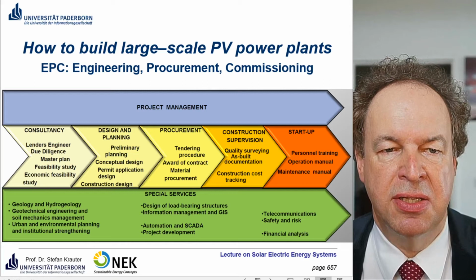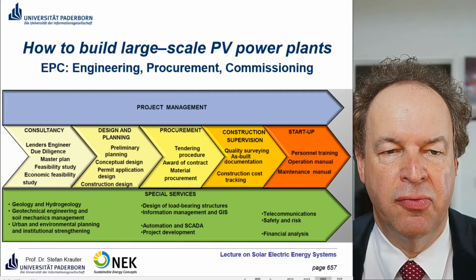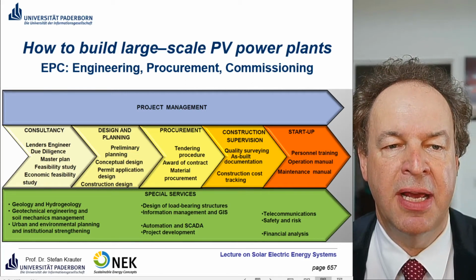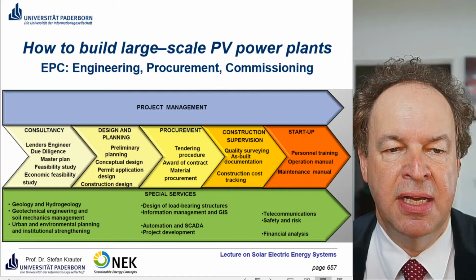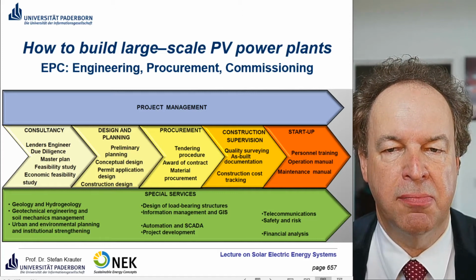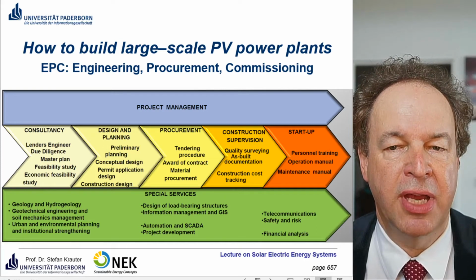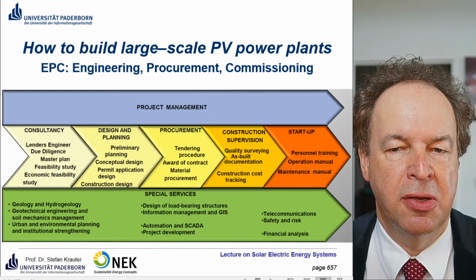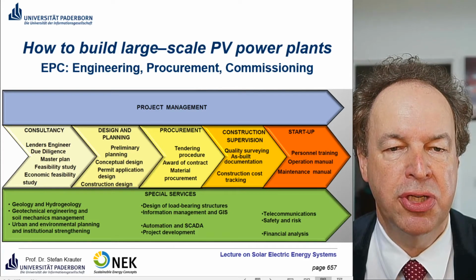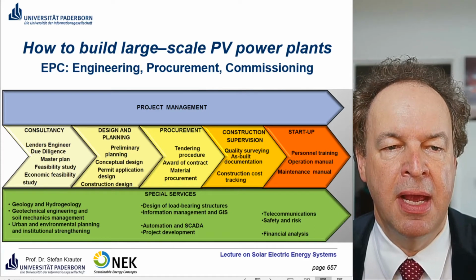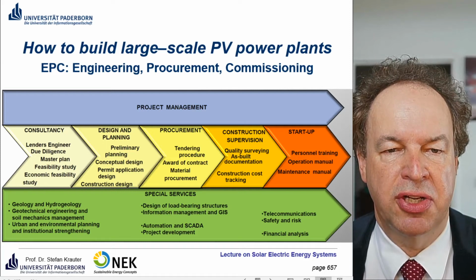Then it's the concrete design and planning. So first it starts with a preliminary planning, then a conceptual design, then the permit application, because sometimes you have to get permits from the utilities because you want to achieve a power purchase agreement called PPA, and the construction design.